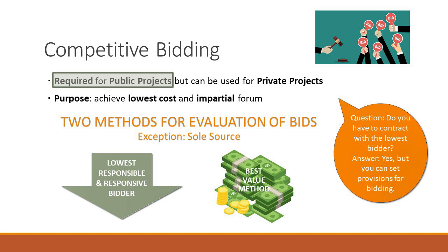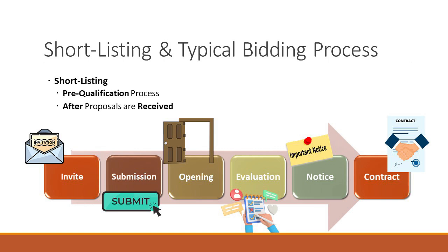Okay, well, last couple things in the slide. So they talk about short lists. So once you send out the RFP, the request for proposals, once the proposals come back in, you could have a short list. There could be a pre-qualification process, and maybe this goes back to your initial question, where maybe the way you don't get the first contractor you don't like, maybe you have a pre-qualification process and somehow they don't qualify. Again, if it's a public project, there have to be objective standards. But some of those standards may include their cost overruns on other projects or what have you.